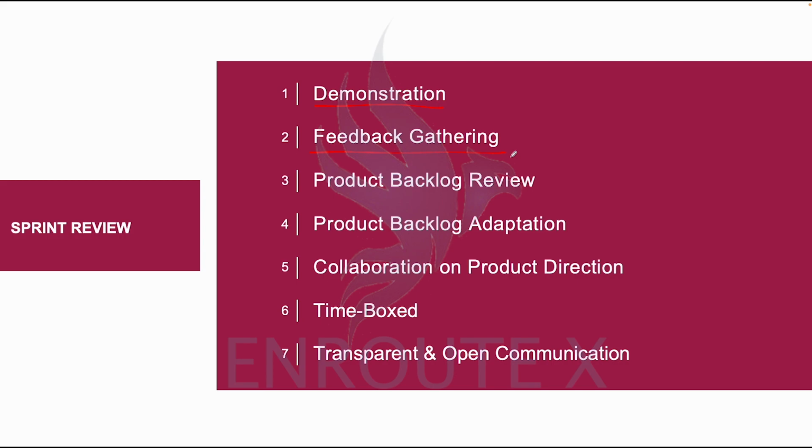In the illustration we've been using, building a house, let's say we run a 1 weekly sprint. At the end of the week, let's say on a Friday, the stakeholders would visit the site and see what work had been done. So you want to demonstrate to them what had been carried out within that week.